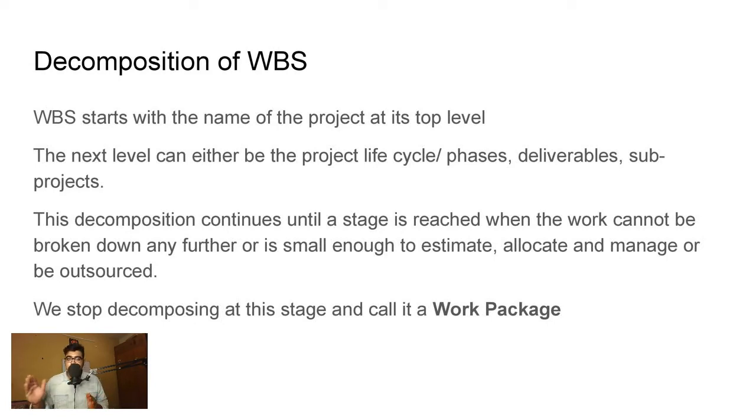WBS starts with the name of the project at its top level. So building a house in this case is its top level. The next level can either be the project lifecycle or phases. It could be deliverables or subprojects. This is what we saw in the definition as well, right? We're breaking it down into small segments.